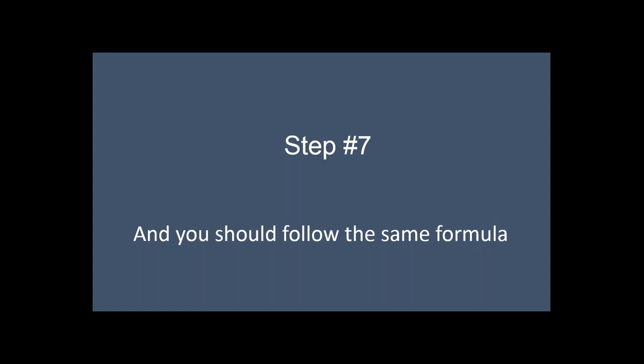So from this formula, you can say that my freelancer will take 6 days, plus my quality control and other stuff will take half a day, so 6.5 days.